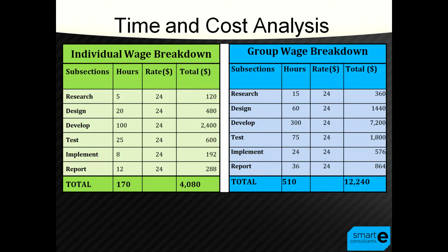In terms of hours that each member should be putting into this project, the group struggled to reach a number that sounded accurate. It was stated on the course synopsis for CSC 3600 that 84 hours should be spent on private study and 84 hours on project work. With the guidance of Dr. David Lai, it was decided that the estimated time per group would be 170 hours, adding up to a grand total of 510 hours.